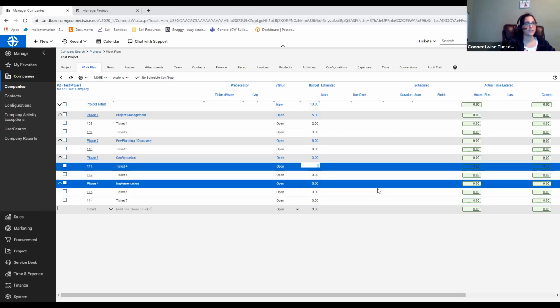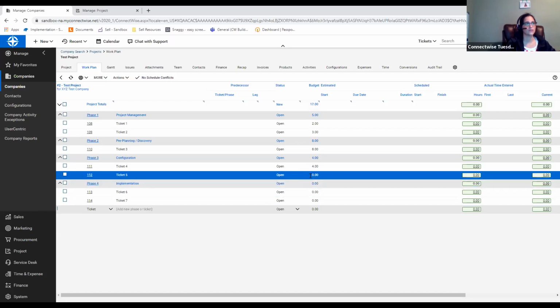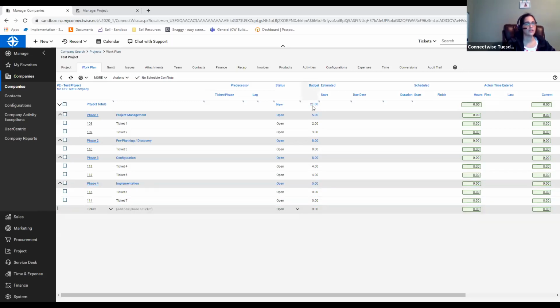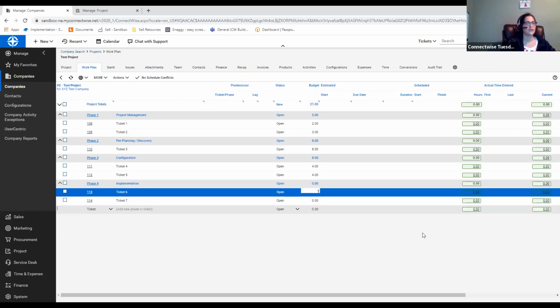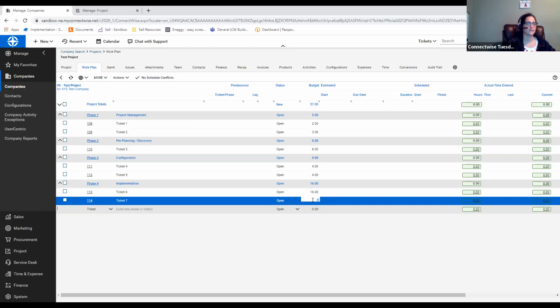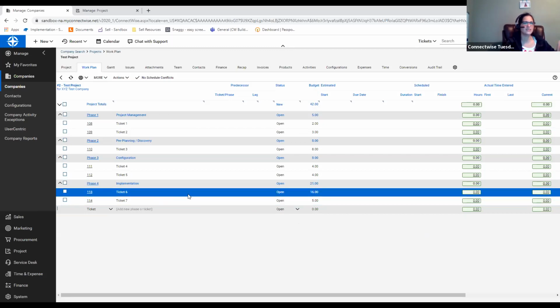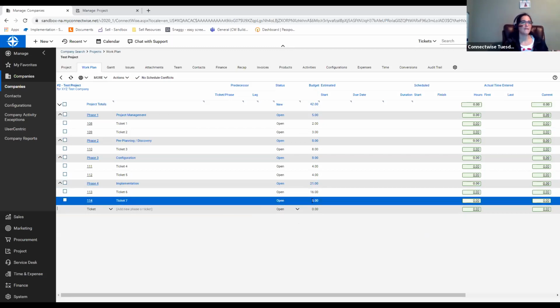So now in our configuration stage, I'm going to say this one's 4 hours, and this one is 4 hours, and now we're at 21 hours. So I still technically have another 29 hours. I probably won't budget for all 50. Maybe we will. I'll give 16 hours here and another 5 hours here. So let's do like 2 days of on-site, and then maybe like 5 hours of post-implementation support, those troubleshooting, remediation, things that happen to come up in every project, right?